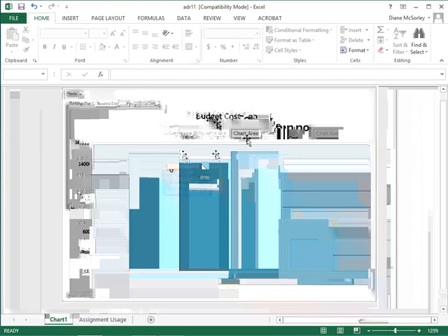The cost column shows me what my plan is saying now. My plan right now is saying that we're going to spend $14,884. A little bit higher than the baseline, but lower than the budget. Whew, it's cutting it close. And then the actual shows me what we've actually already done. That's what we've actually already spent, $61.48. So the reports are great. And when you're done viewing your visual report, you can use the X in the top right corner to close out of it, save or not save.